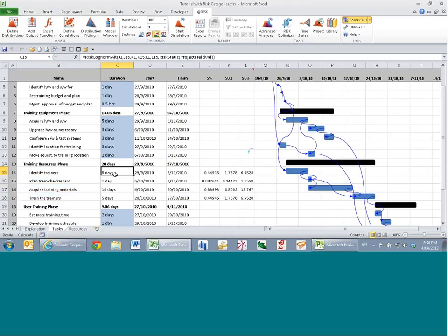And now I can utilize these cells as the parameters for these probability distributions, which are the quite sophisticated log norm alt functions. Same 3-point estimate. Those of you who have done training with me or have worked with me on, say, project cost estimation know that I heartily endorse the 3-point estimate idea, but also that doesn't restrict you to using triangle and PERT functions. Using the alt parameters, we can use log normals and so on, these more realistic distributions. In this case, you'll notice that they are, by default, P5, P50, and P95 of each of these.